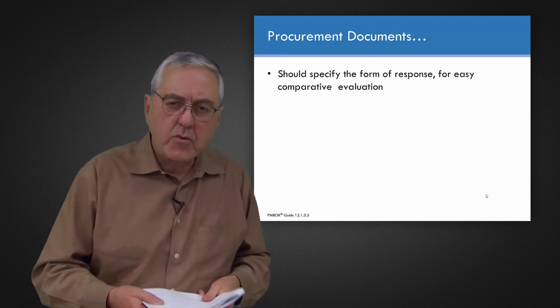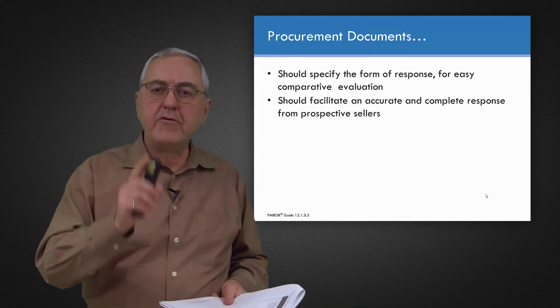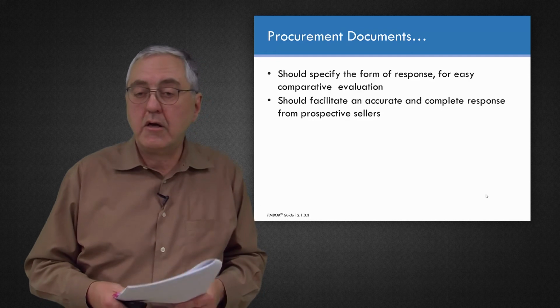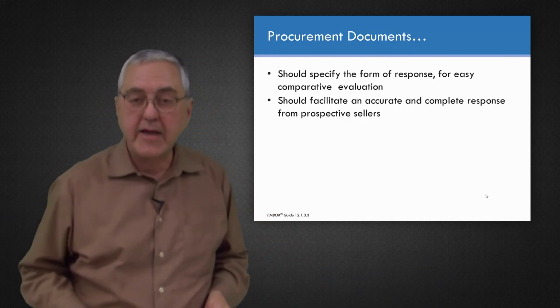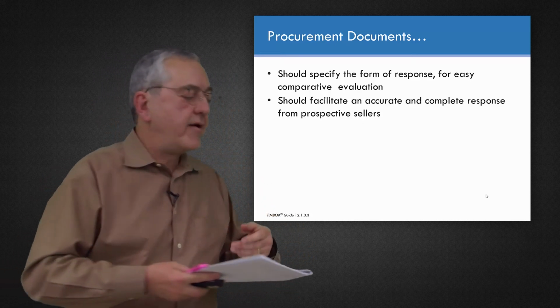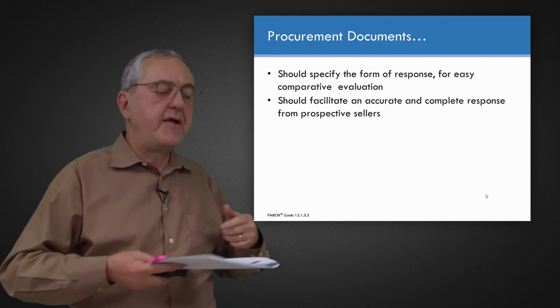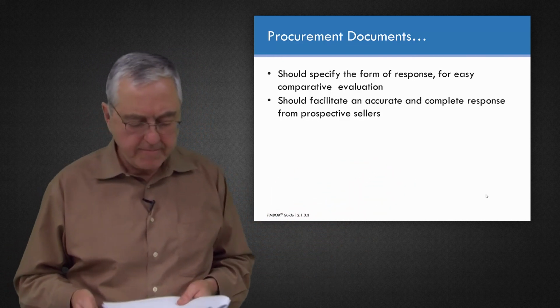That kind of request of giving them the format helps make sure that they all give you a complete and accurate response. By them filling in all the fields, you do in fact get all the information that you want. I've been in a situation where I've had to compare competing proposals, and they're all written differently and structured differently, and very hard to compare.